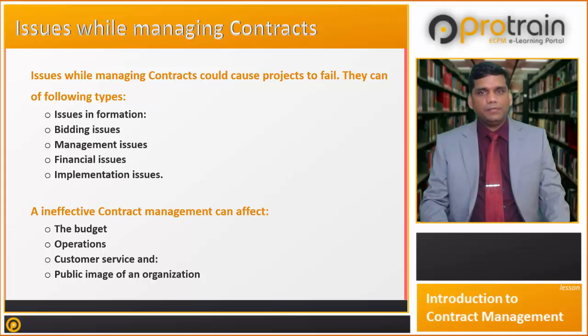Normally it is seen that in most of the contracts, the contractor delays the submission of the program and the employer delays its approval of the program. Delays in submission of drawings and their approval by the employer. Delays in submission of invoices or submission of incorrect invoices is also a primary cause of late payments in most of the contracts.